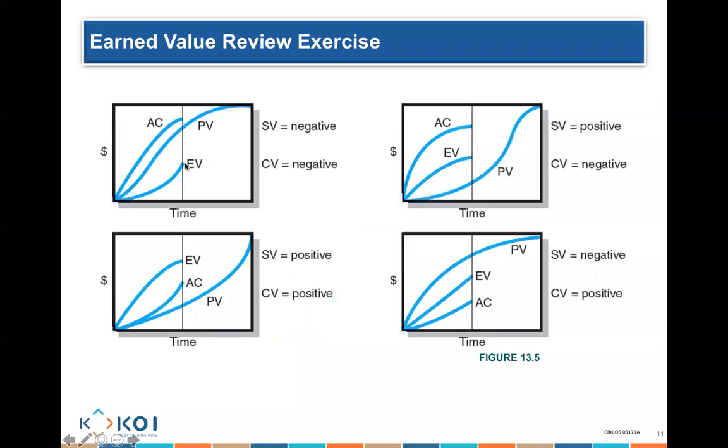Okay, I'm earning that much work. I was planning to finish much more work. So I earned, let's say, $10. I was planned to earn $20. When you compare earned to planned, earned value minus planned value gives you what we call the schedule variance. So in terms of schedule, because I am earning less money than I planned to earn, I am negative, so I am behind schedule. Does that make sense?